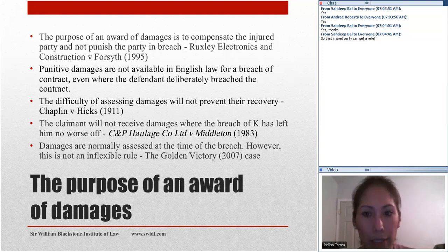Okay, one of the judges held that Mr. Middleton's loss didn't flow from the breach of contract, but from him going and doing the repairs when he was not meant to, because let's remember, that was not in the contract, and also the contract said the fixtures were not to be removed. So no recovery of reliance loss was available where it would allow Middleton to escape a bad bargain or reverse the contractual allocation of risk.